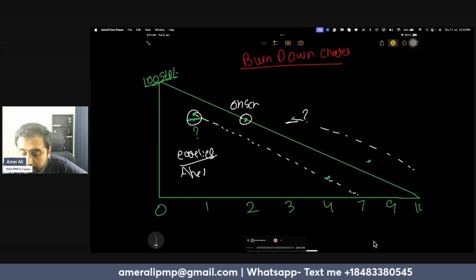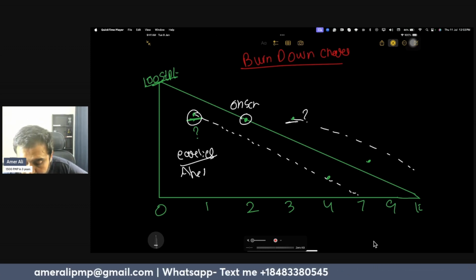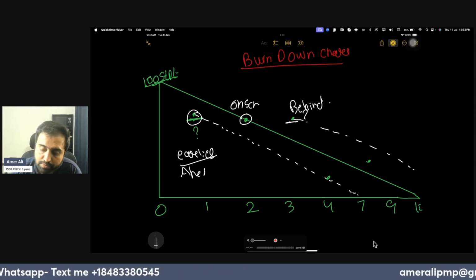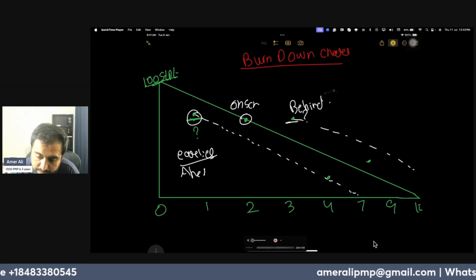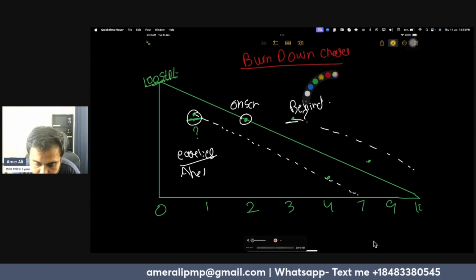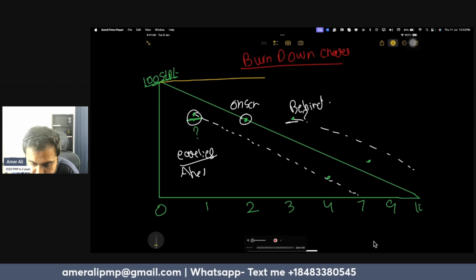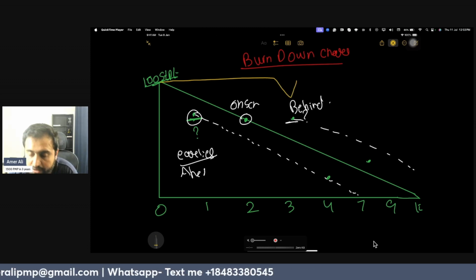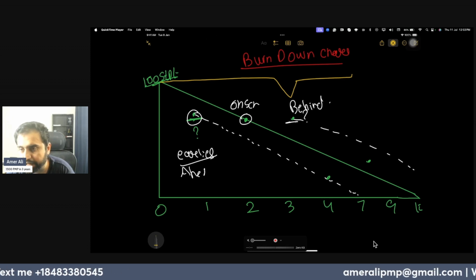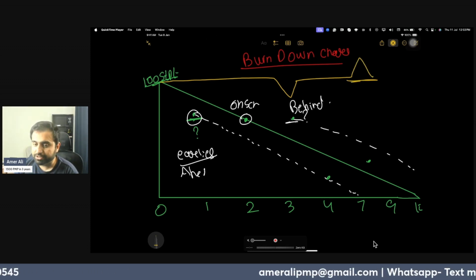So we are behind the schedule. Now, similarly on the Burndown chart, if it shows this is your scope and it has gone downside, this work has been removed, upside the work has been added. Both of them are called spike.